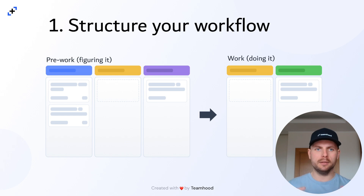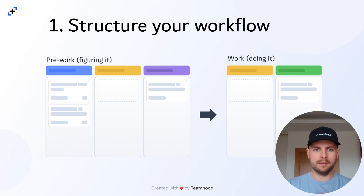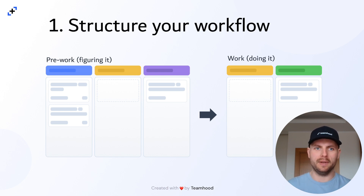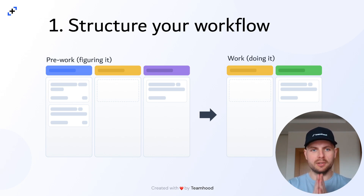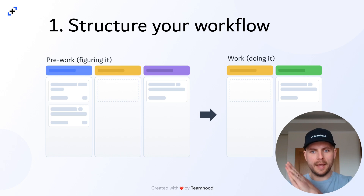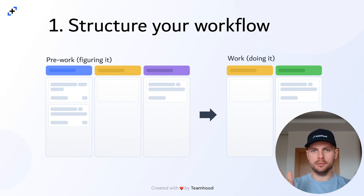Let's start, and I usually start from the actual flow or workflow, as most people call it. When we're speaking about the process, it's all about value creation. That part where you create value can be complex, and you might have more stages than you actually think. A good example of how to improve that situation is to structure your workflow by splitting it into two essential pieces: one for figuring stuff out — which I call pre-work — and then the actual work part where you are doing it. Figuring out and doing it, split into two different pieces.